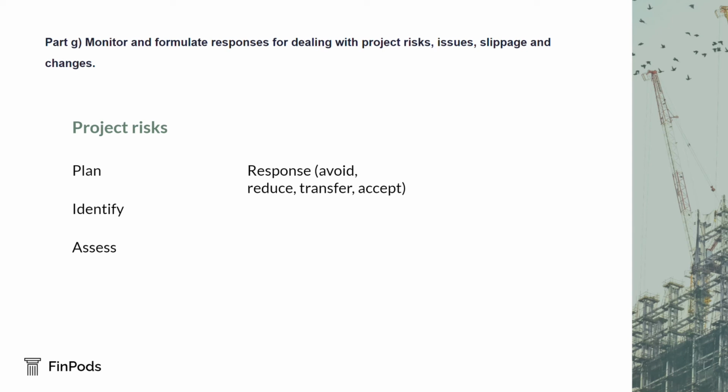Reduction or mitigation. The potential for the risk cannot be removed, but mitigation can reduce the severity of any loss or the likelihood of the loss occurring, for example, by entering into an escrow agreement alongside the purchase of a bespoke software solution.